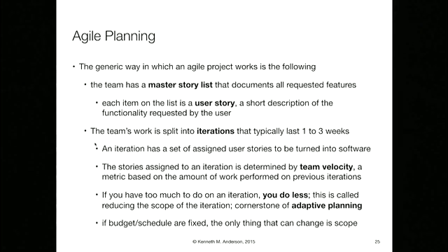Then you actually track. You say, we picked 50. We go through the iteration. At the end, we've delivered a bunch of functionality, but not everything. So we said our velocity was 50, and we delivered 30 points' worth of stories. So what Agile does is it says for iteration 2, you have 30 points. That's your velocity. Now you're basing it on the work you actually achieved. It doesn't matter if someone was sick for 2 days. It doesn't matter if there was this weird compiler bug that tripped us up for 1 day. Don't worry about that. You delivered 30 points. Use that to plan the next iteration. If on that second iteration you get back up to 50, well, then your third iteration will be 50. You track what you can actually do based on what you have been doing.